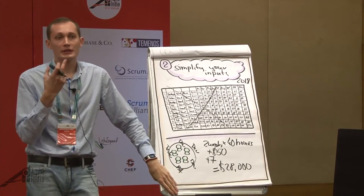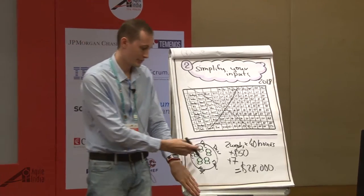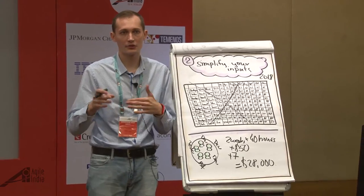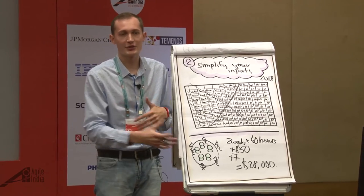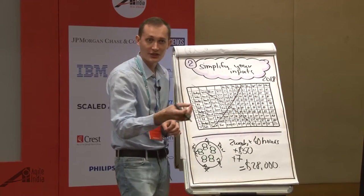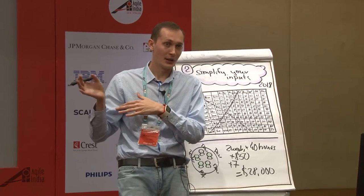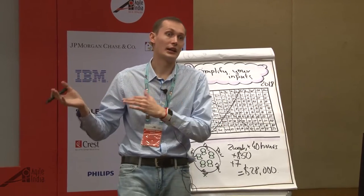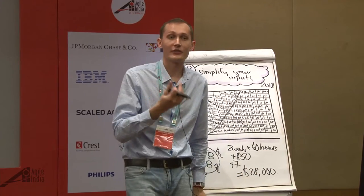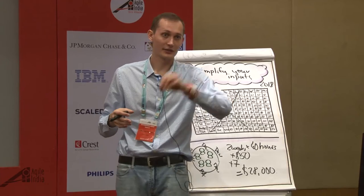You can take a blended cost or split it by role — developers, business analysts, and testers cost slightly different. You might have a small table saying three developers at $50, one tester at $40, and one business analyst at $65. You can still do the same type of calculation, or use a blended cost taking care of extra training and all of that.